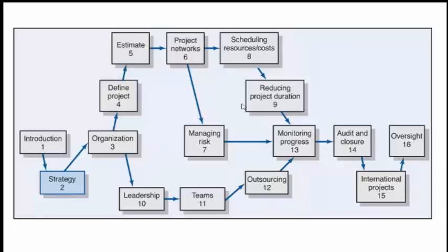So the advantage is they may not insist on how many resources you involve in the project. They give you this money and they ask you to deliver based on the service level agreements. You need to deliver the project as per the contract and the service level agreements. So in fixed price, the risk is with the executing organization. In time and material, the risk is with the customer, because whether you do it or not, they need to pay on a monthly basis or a weekly basis. They need to clear your invoices.